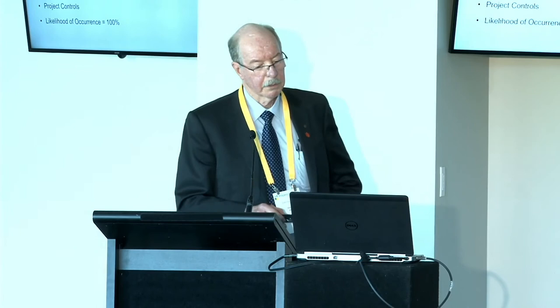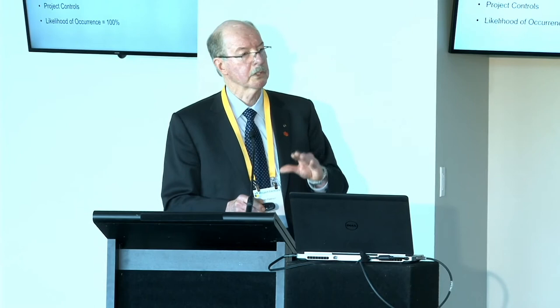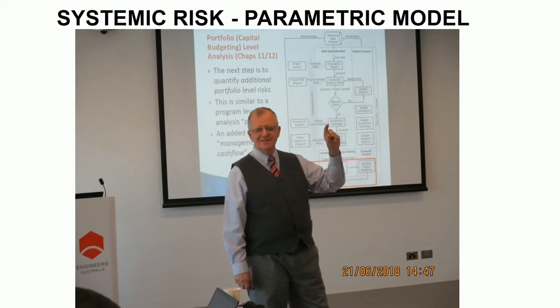The next one is team development. John Holman has said that's the second most important area, and first-of-a-kind — FOAC — is Tim Rigby's acronym out of Bechtel. Project controls follow. The likelihood of occurrence of systemic risks is 100%, which distinguishes it from project specific risks that have a likelihood less than 100%. I invited John to Melbourne in June last year and he gave us a three-day course in Melbourne on project risk quantification.